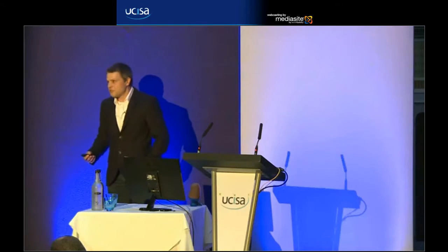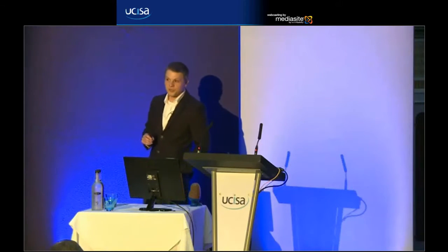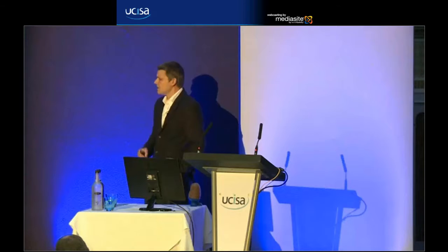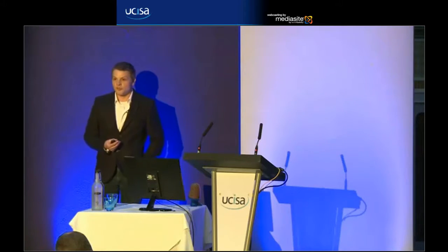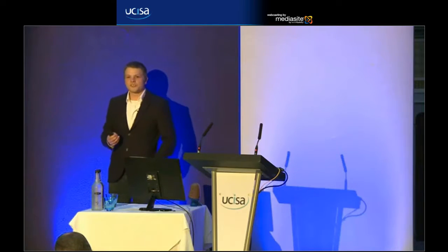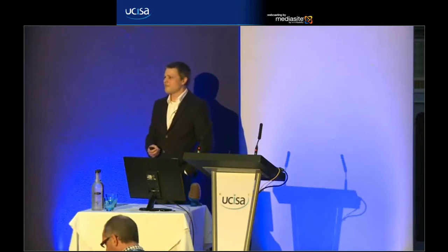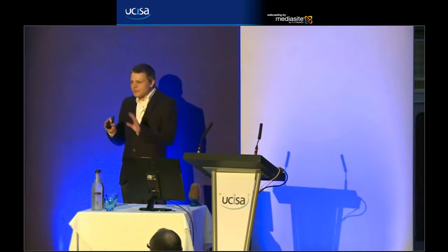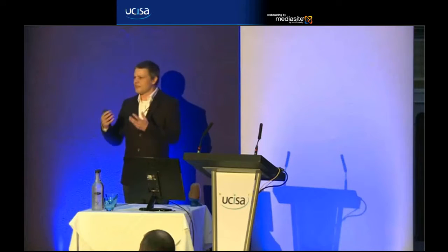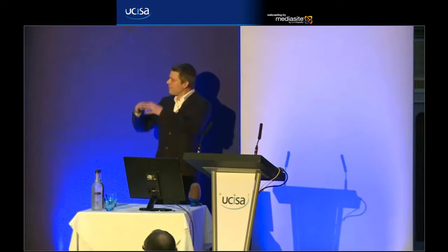When you actually start to use an application, when you've actually developed something, they'll then think, oh, well, this doesn't work as well as we thought it would. We want to change it. And there's a tendency amongst that traditional project approach for changes not to be desired. You know, you've got to have change control around your project. And there's a tendency to say, you know, scope creep is coming in, things like that. So there's this tendency not to want to change the project once you've fixed your requirements and your design and everything.